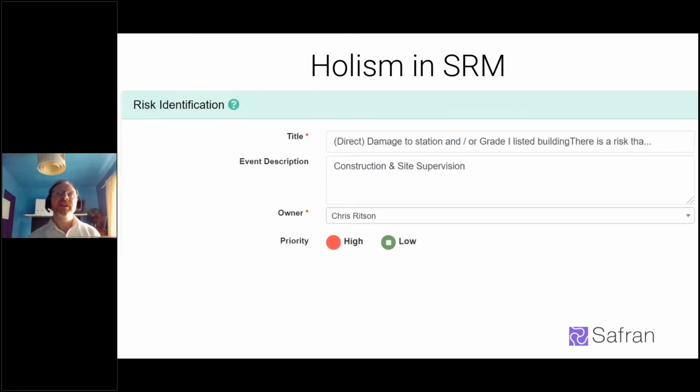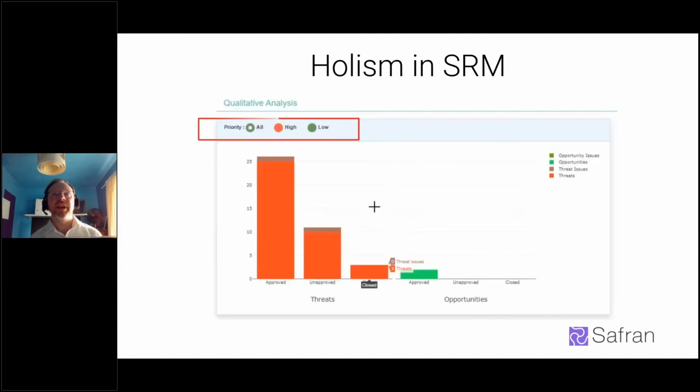Secondly, whoever has the authority to decide which risks are the priorities, they will receive a portion of their constrained resources. So what we can do is we can simplify that by toggling a high-low flag, and that will act as both an escalation feature, but also feature in part of the reporting tool, which, such as here on the real-time dashboard, it gives a simple way to enact the 80-20 rule or the Pareto principle, if you prefer.